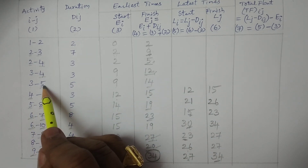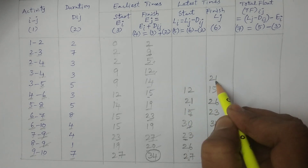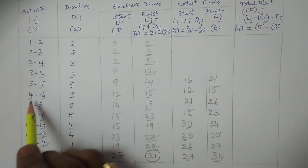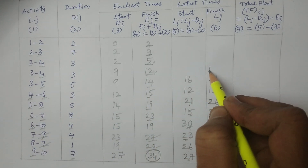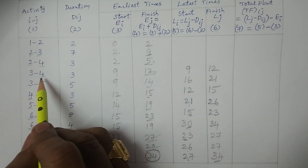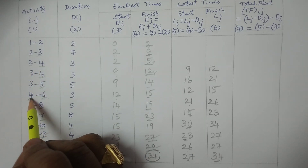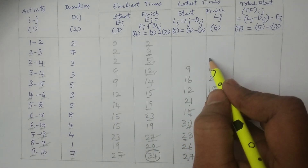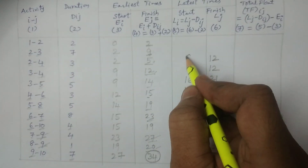For 3 to 5: only one value of 21. 21 minus 5 equals 16. For 3 to 4: only one value of 12. 12 minus 3 equals 9. For 2 to 4: L4 is 12, only one value. 12 minus 3 equals 9.